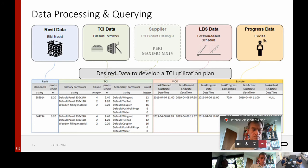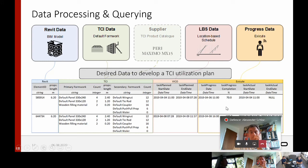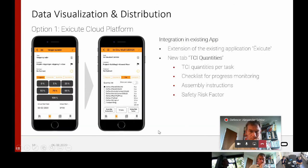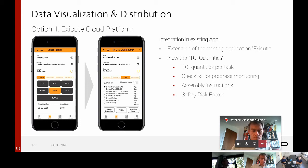Here you can see the simple data table visualization with the query. You can see in the beginning the wall instances with the length information from the Revit model, then the TCI information with the quantities and types of TCIs used from the TCI data, as well as the schedule information from the LBS data and the progress information from Execute. The first more advanced option for visualizing the data is the mobile application from Execute, where I developed a new tab presenting the TCI information. This tab contains TCI quantities for each task on the construction site, provides construction workers with a checklist for progress monitoring, and you can also add assembly instructions for TCIs to ensure safe and correct installation, as well as a safety risk factor to raise the safety awareness of risky operations.